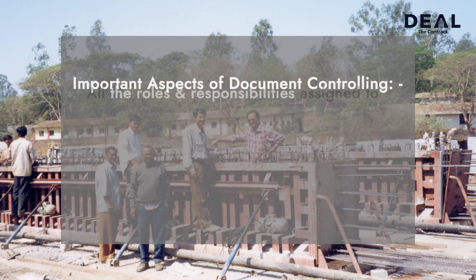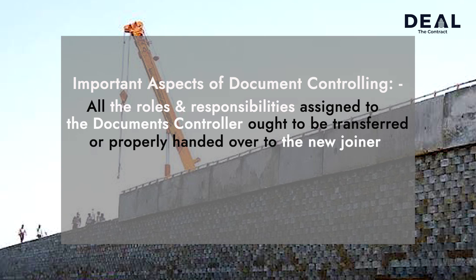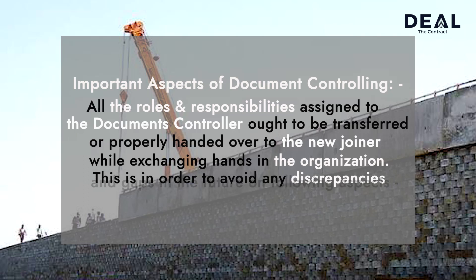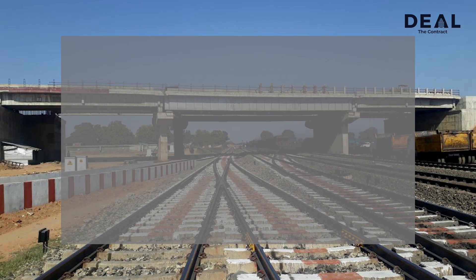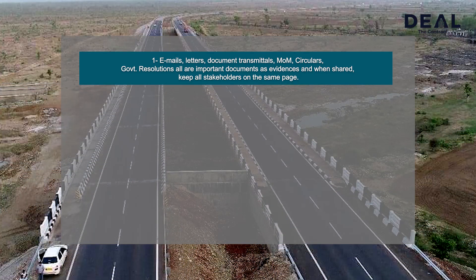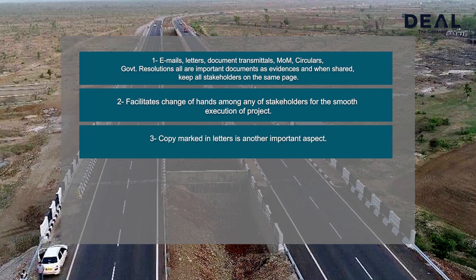Important aspects of document controlling: All the roles and responsibilities assigned to the document controller ought to be properly handed over to the new joiner while exchanging hands in the organization, in order to avoid any discrepancies and gaps. Emails, letters, document transmittals, minutes of meeting, circulars, government resolutions — all are important documents as evidences and when shared keep all stakeholders on the same page. This also facilitates change of hands among any of the stakeholders for the smooth execution of the project. Copy marked in letters is another important aspect.